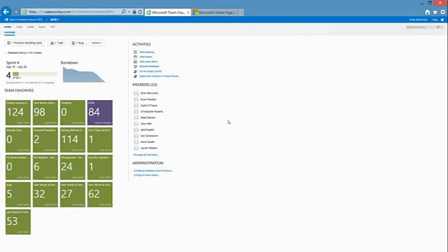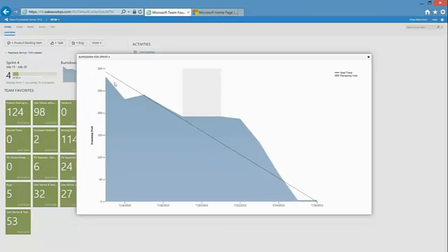Sure thing. So what you're seeing now is actually one of the development projects that I'm leading here at Oakwood. And you can see our burn down chart here. If you're familiar with burn down charts, what this looks like is it started out up here, came down a little bit. We got a little bit more information to finish our estimating the second day of our sprint. And from here, we had a little bit of a plateau for a weekend. We can see right here, after that weekend, a little bit more plateau. That's a couple people being out sick, and then everybody gets back, and we fire on all cylinders, and we drive toward the end of a sprint.